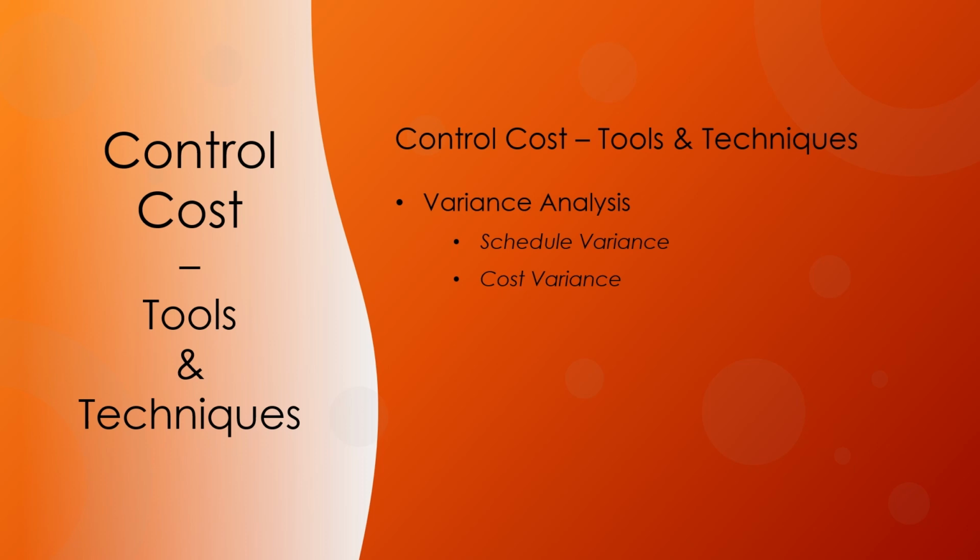The cost variance at the end of the project will be the difference between the budget at completion and the actual amount spent. The CV is particularly critical because it indicates the relationship of physical performance to the cost spent. Negative CV is often difficult for the project to recover. It's represented as the equation CV equals EV minus AC.